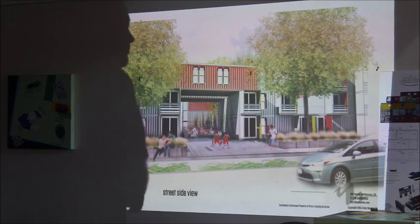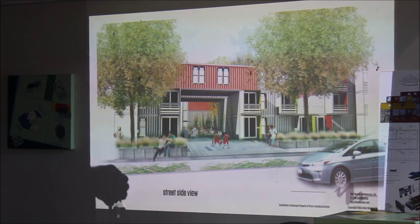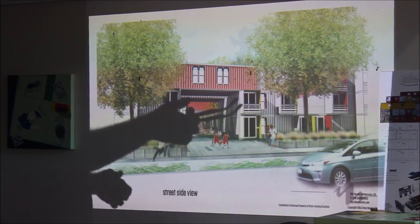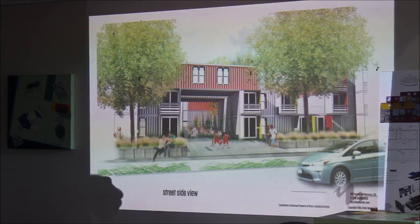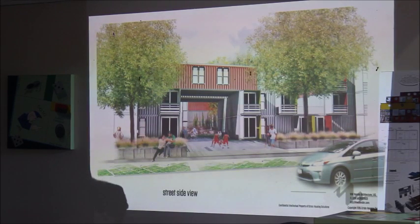They are volatile, like most building materials can be. We're doing one in Sarasota right now, we purchase containers for $2,250 delivered, and I think that's about what we did here. Yeah. Over all that time, I think it's about the same. We had some that were $1,850, some that were $2,250, depending. And you can't actually tell the difference between them. It's kind of arbitrary, the pricing. So those haven't changed that much.